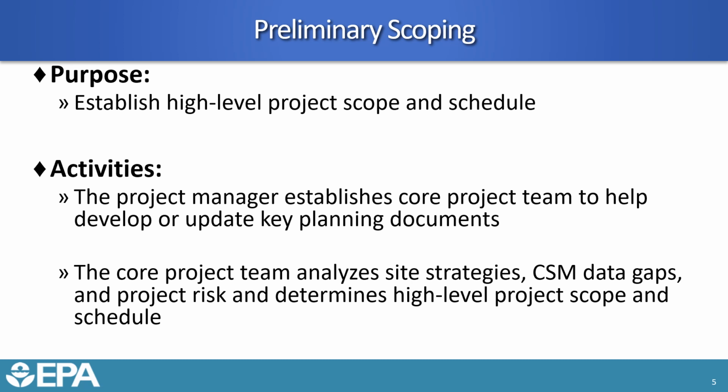or specific plans that help develop the reports for either characterization or design or construction. Another key activity will be for the project team to analyze site strategies, the conceptual site model, data gaps, and the project risks to determine high-level project scope and schedule.